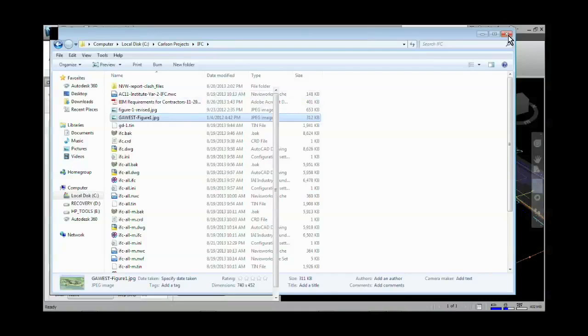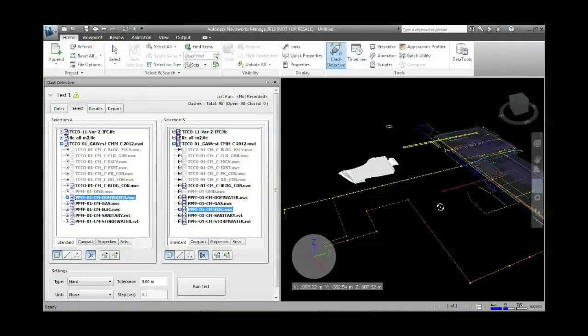And the idea was that the contractor had to use BIM, and they had to find their own conflicts before any blades touched the ground. What the client is trying to do is eliminate change orders. Because if the contractor does not use BIM to find their conflicts before they go to construction, they will eat the change orders. So this is a massive change occurring in our industry right now where they're trying to get rid of change orders. And of course, you know how lucrative they can be. So some clients now are getting into BIM.